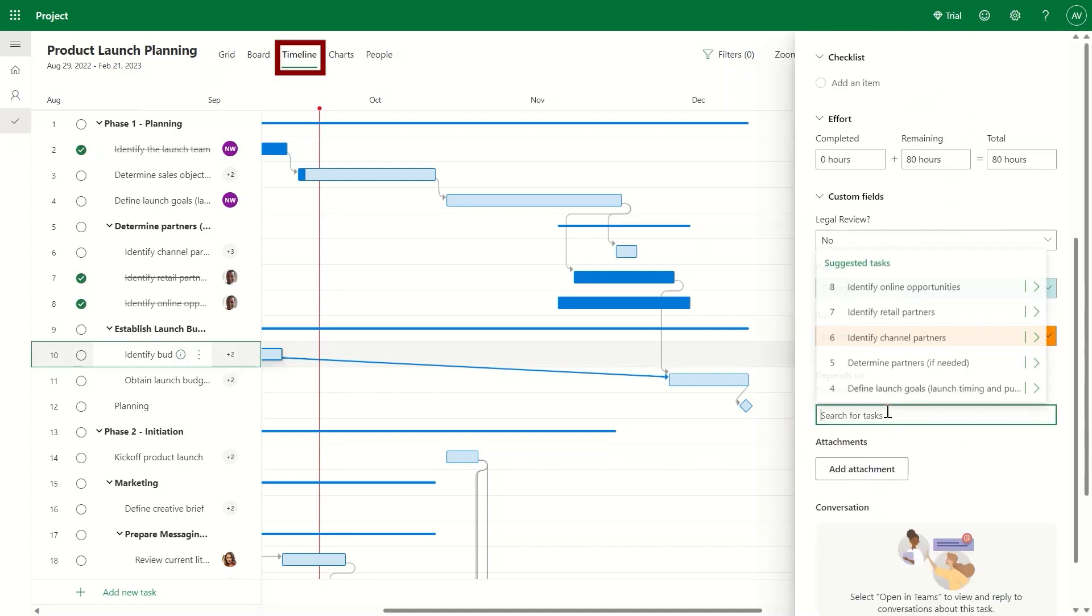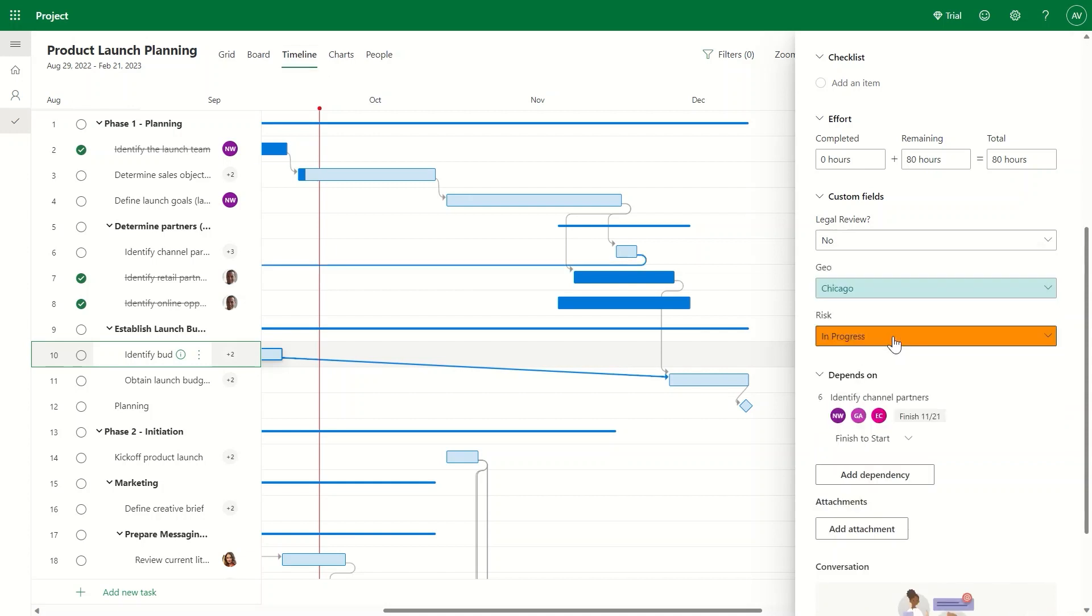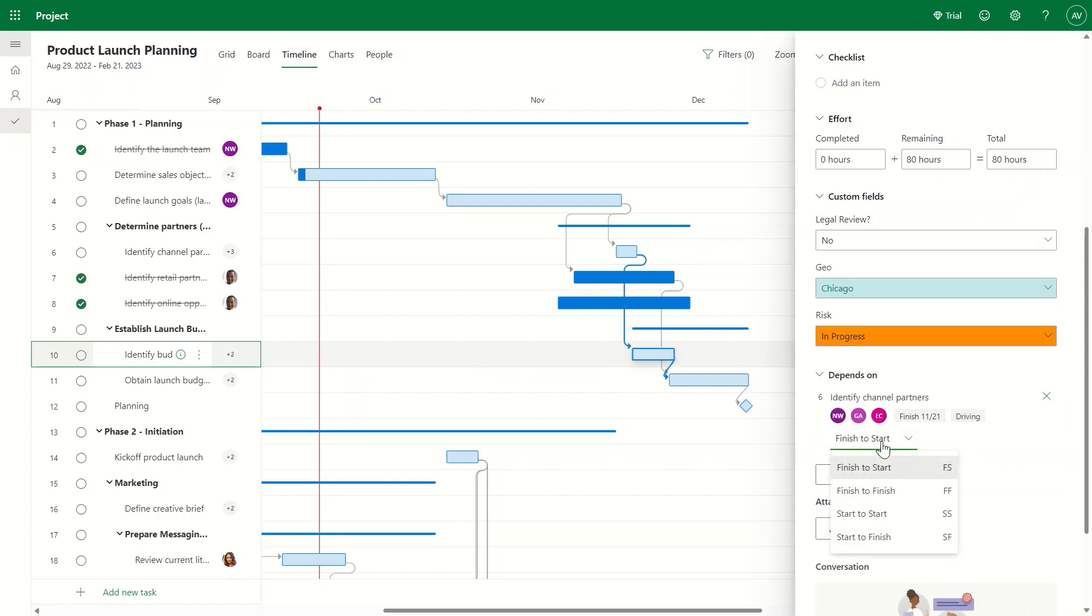You can simply set up the dependencies between tasks with the suggested list, and you can even define the type of dependency for more flexibility.